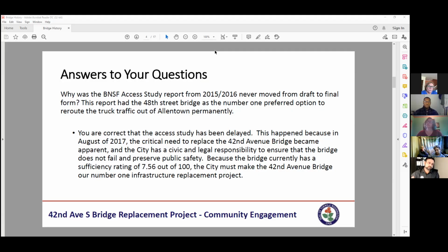And so the bridge has reached its design life. That's another piece of information that, if we roll down this presentation, it would say the bridge was designed for 75 years, and it has been in commission for 75 years. So with that being said, can we save the bridge, repair the bridge? Can we just use it for cars? All these are questions that we will look at. We'll use the technical experts and consultants to tell us. We're here to do what it takes to save and maintain and preserve our historic buildings and values.